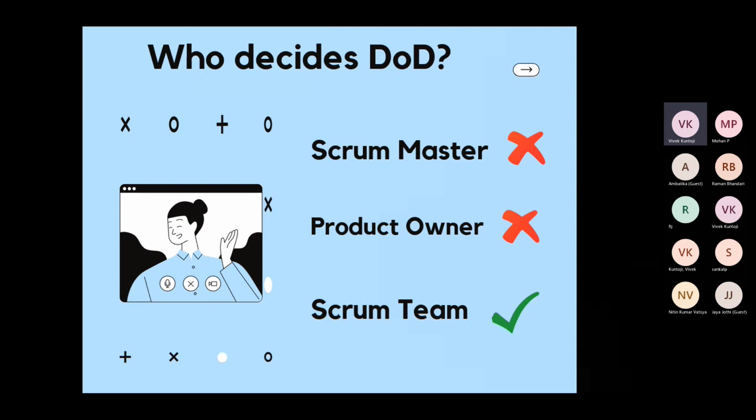Yes. So if your user story does not meet the definition of done, then according to me, and even according to some articles on famous sites, we are not even supposed to show that work item in the sprint review. If your definition of done also includes a point wherein a PO should sign off, then that's a different story. But if that point is not included, and the definition of done has points only up to the step before the sign off, then if it has not met the definition of done criteria, it should not even be part of the sprint review.